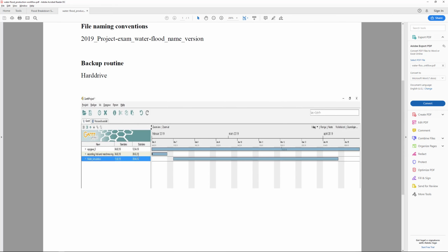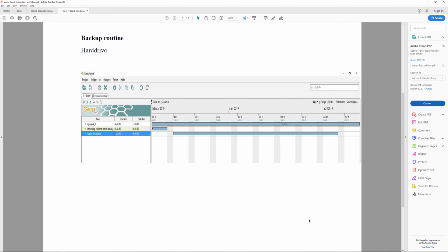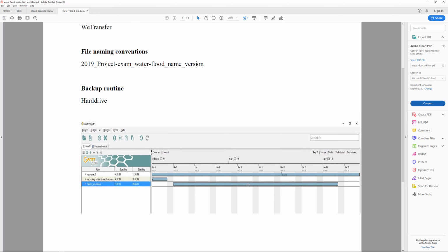And then your project timeline, your Gantt chart over here, is HDRI recording and match moving, and then you just have water simulation for the entire rest of the time. I think that's not really fair. I think you need to have compositing in there. Probably you're going to have some modeling because you were modeling quite a lot of things. You're definitely going to be rendering in there. You're definitely going to be having things like iterations and version 1s and version 2s in there.